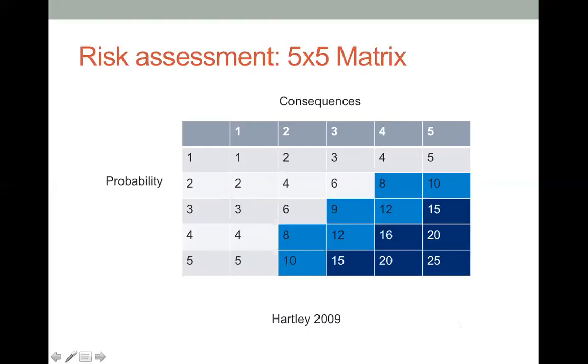Okay, so let's say we have a risk event, for instance, the likelihood of an accident happening because of hazards that we identify at the workplace, and the likelihood is quite high. How high? Let's say 5. Very high, it's certain to happen. And what about the consequence or impact? Well, it's also quite high because someone may need to stay in the hospital for quite a long period. So that means 5 as well. Well, 5 by 5, we get 25. Okay, so that is very, very high.